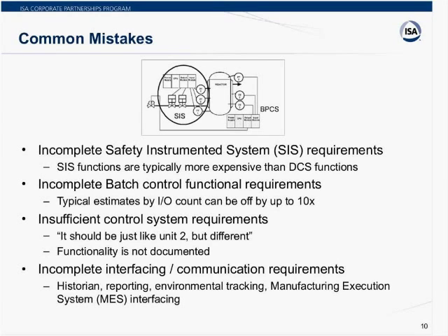And the whole life cycle process of doing that work as well, you're going through your safety requirements spec, and you're going to have to do the validation and the planning and the test procedures. So it adds a lot of cost if we miss that. The worst case I would recall is where we had an analyzer that we had to add as part of a safety system. And when you're dealing with analyzer systems and safety systems, it gets really outrageous, long delivery, those kind of things.